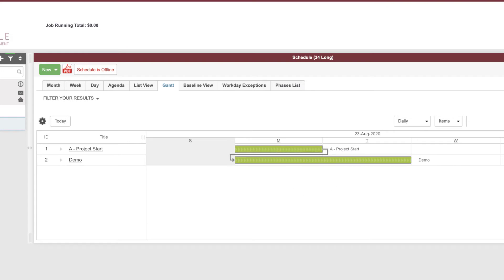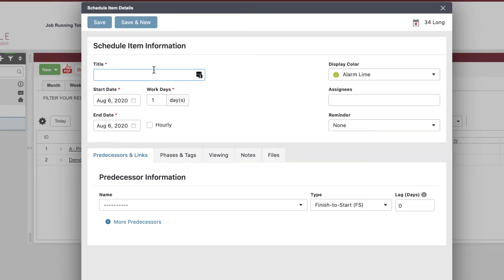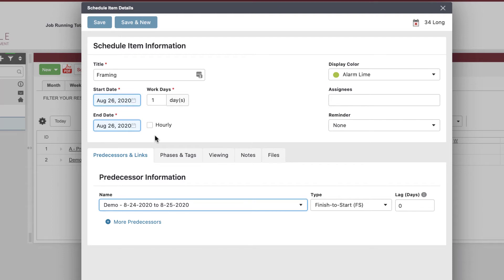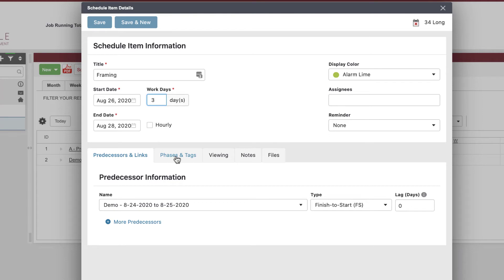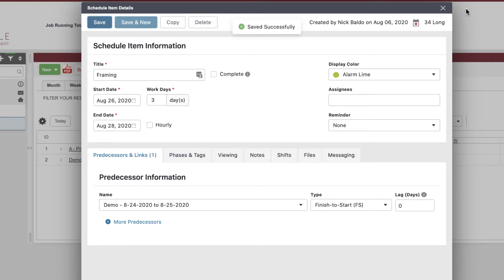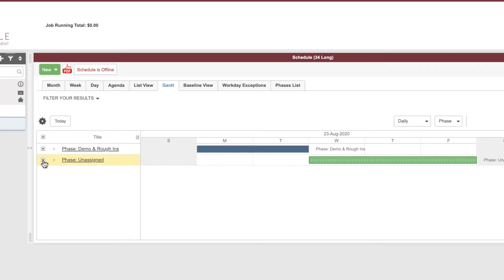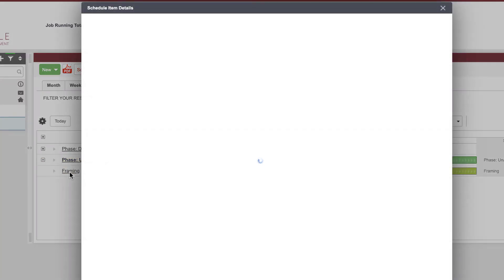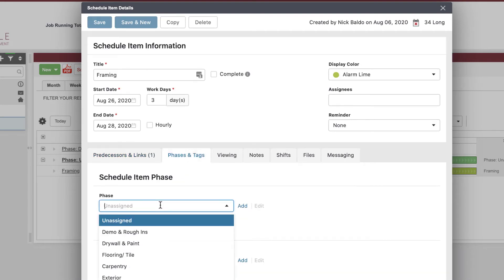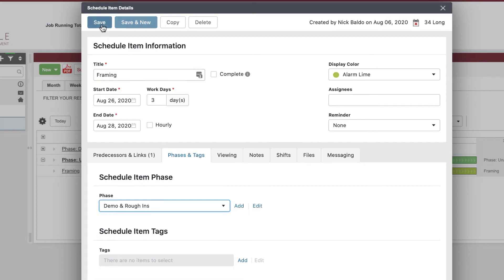Let's add more schedule items. After demo, I'm generally going to do some framing — maybe miscellaneous framing, maybe structural. Let's say framing takes three days. I will not start framing until demo is complete, so finish-to-start with zero lag makes complete sense. I'll put framing into a phase. Notice that if I don't assign a phase, an 'unassigned' phase pops up. I'm going to assign it to a phase now. Everything I'm doing here can be saved into a template, so there's a lot of work to establish your first schedule, but once you do it you can draw on that template for future projects.